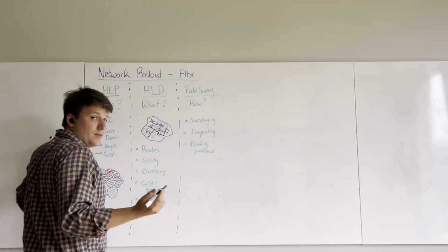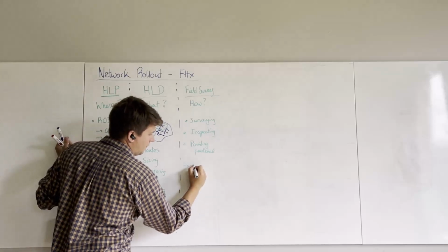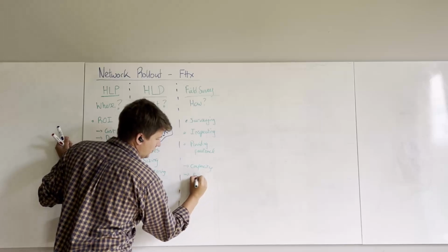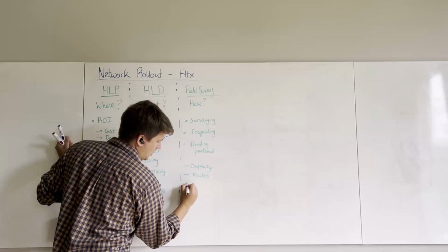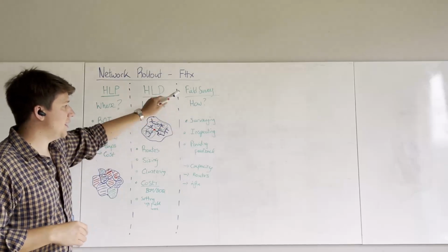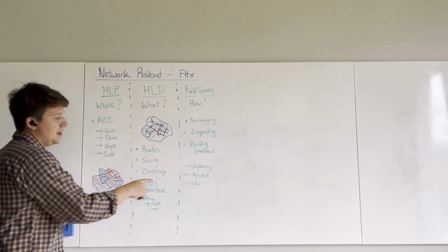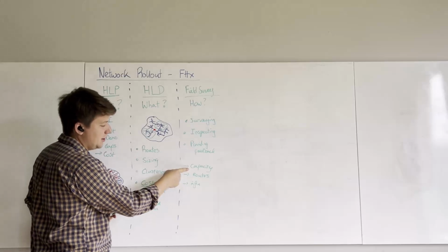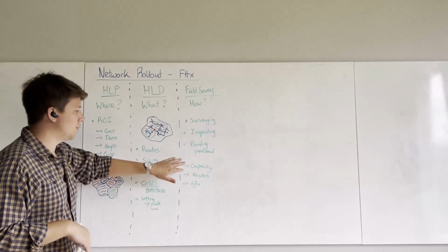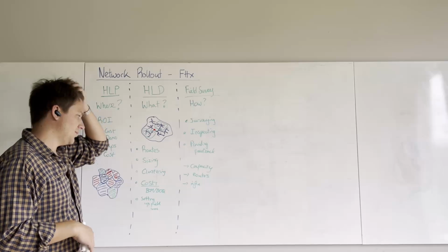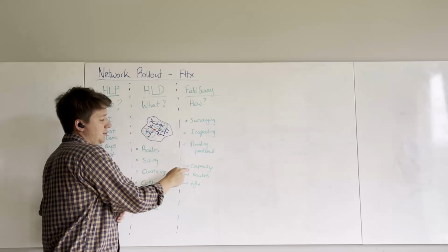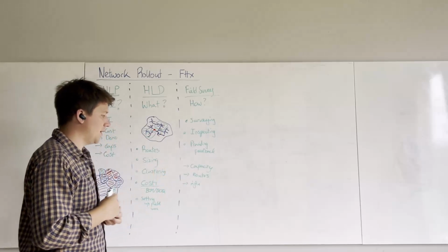So, typical things here: capacity, routes, infrastructure. These are typical things that you want to survey, inspect, and provide feedback on. You might be looking to borrow existing infrastructure, right? So what is the capacity on that? Let's take the UK market as an example, where you might be borrowing PIA, same concept in other countries as well. Can I actually use that infrastructure to place my cables, or is it full? I need to go out and survey that.